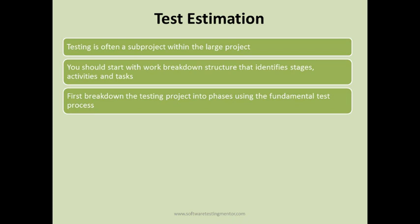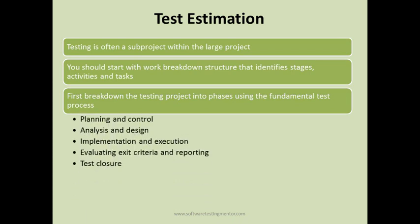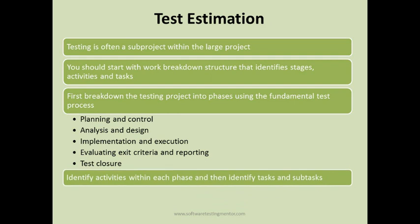First, break down your testing project into different phases using the fundamental test process. You can break down the phases in the testing cycle — for example: planning and control, analysis and design, implementation and execution, evaluating exit criteria and reporting, and test closure activity. Usually all testing cycles have these phases, so first identify what phases are there in your testing cycle.